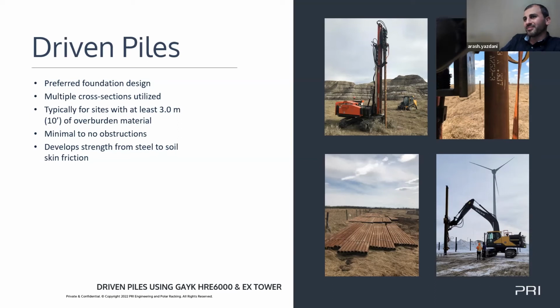We're working on a site recently where we definitely proposed round posts, because we knew there were going to be a lot of areas where you'd have to sleeve it. And that's for sure the right option. But if you go with the W section on that exact site, the sleeving becomes 5 times more, 10 times more, right? People get caught with the shiny number up front, just to pay in the background. That's unfortunate. We see that happening way too much in our industry, right?